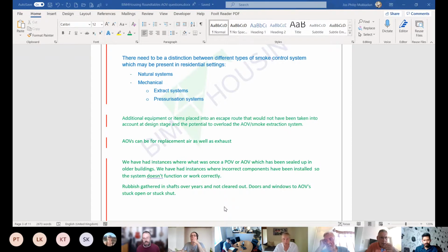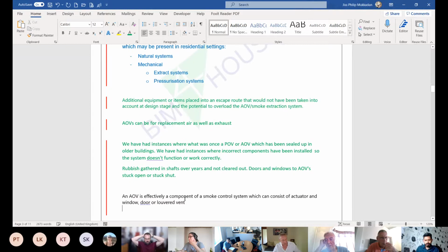Yeah. Well, I'll explain it briefly. Basically, what she was saying was that they had some work done externally, and the people that were doing the work put scaffolding up on the externals of the building, and therefore the AOV couldn't open. So that was a circumstance that probably should have been part of a method statement that identified that to those people.